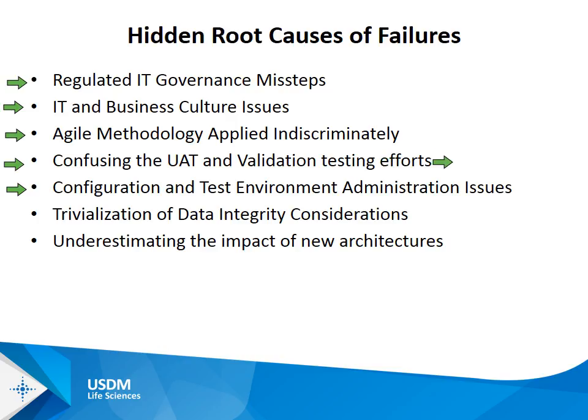Now that's fine for USDM, because we'll do whatever you'd like. As much of the testing you want, we can do. But the end result sometimes is not what people expected. Skipping UATs or combining UAT and validation sometimes causes a lack of critical testing to be undertaken because of the highly aggressive project schedules that are usually accompanying this approach.